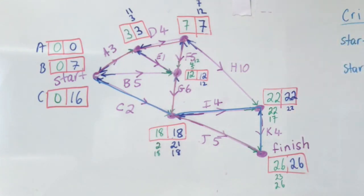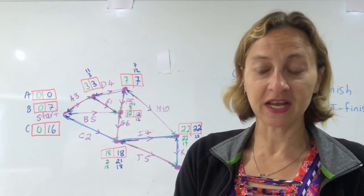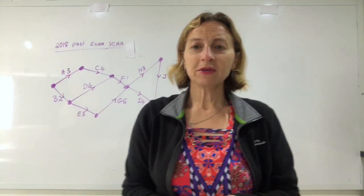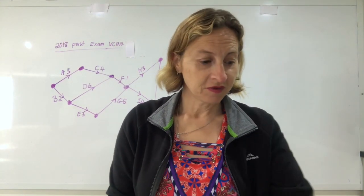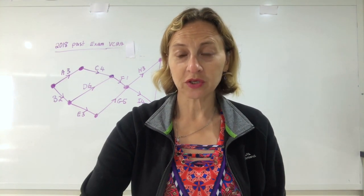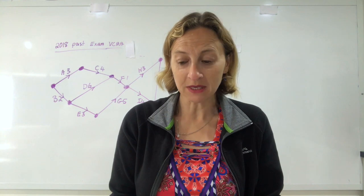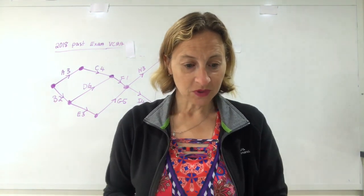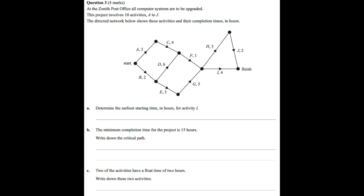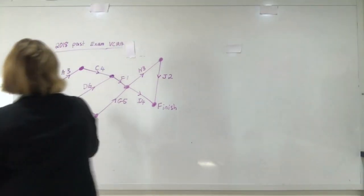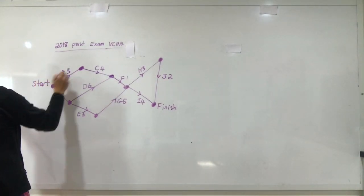As you can see, there can be more than one critical path — sometimes only one, but sometimes more, so the person next to you might get a different answer and that's fine. Here is a past exam paper question from the VCAA in Victoria. At the Zenith Post Office all computer systems are to be upgraded. This project involves 10 activities A to J. The directed network shows the activities and their completion times in hours, with a start and a finish, and all the activities in between.